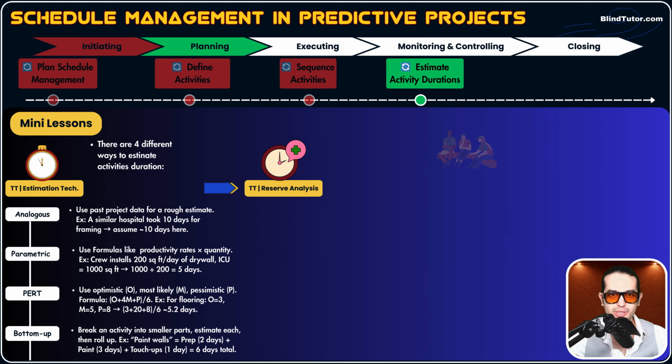we can't do a work. Okay, everything is on hold for a week. For example, we're gonna have harsh winter for a week, so everything would be on hold. Now the new duration would be 10 days plus 7 days, a week, so 17 days. We need to consider 17 days as duration of that activity. That's why considering risk is very important. Why? Because it makes our estimation realistic, guys.